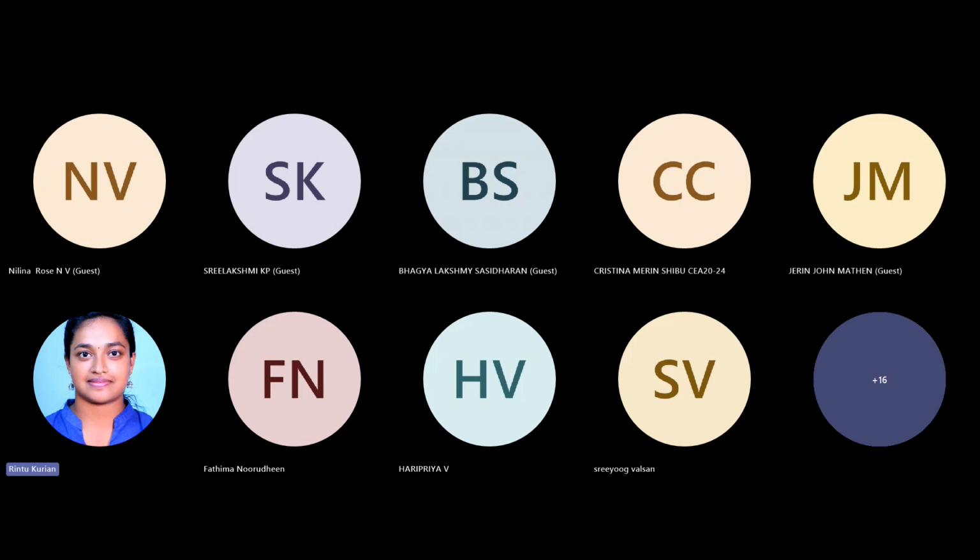For example, assume that you are going to concrete 1 m cube of a slab. The amount of cement, sand, aggregate, labor, machinery, everything combined is almost equivalent to 6,000 to 8,000 rupees, in that range. The steel used for reinforcing that 1 m cube of slab will be equivalent to this 6,000 to 8,000 rupees. So you will have to buy steel as much as that of concrete usually. Now this varies with the design slightly, but for the majority the cost is split among steel and the remaining materials.